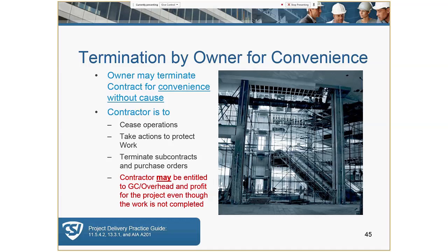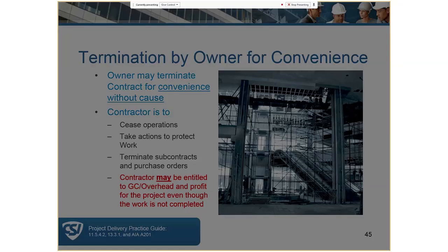Very important to remember that the contractor may be entitled to compensation for overhead and profit, as well as lease costs, demobilization costs for equipment, or job site trailers that are rented for extended periods of time. So just because the work stops doesn't mean that the spigot of money is turned off.